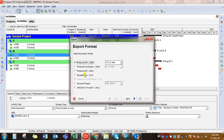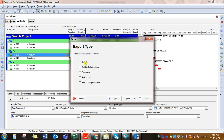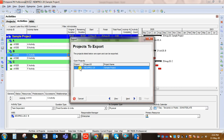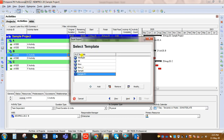Now we go to Primavera and export the Excel file. Click Export, click Spreadsheet, then click Activities. We are not going to cover activity relationships — we will do that in the next session. At the moment we will only work with activities. Check Activities, click Next, check Export. It shows your project name. Click Next. Here we have some templates — I have already created one, so I will show you which fields are required to import the update correctly.